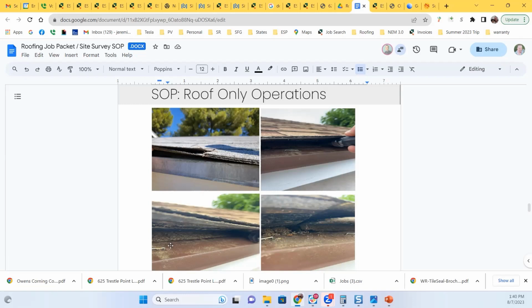Sometimes there's 1 layer of shingle under the edge metal, and so you know that's just 1 more layer. But sometimes this is just the top layer of a whole book of layers of shingles underneath that edge metal. And that would be a surprise. That would be a change order, something that we discover down the line. So if you want this to be accurate, you want to try to discover that up front. Just get down to the wood as much as possible.